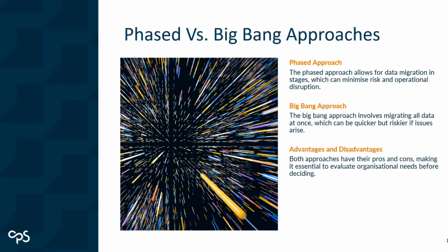One of the biggest cons with the phased approach is the longer duration it takes. It really depends on the amount of projects you're looking to use. We've worked with clients that have exported along the lines of 2,000 or 3,000 projects, to some that have only done 20. Depending upon that approach, the duration can be massively extended if you're utilizing a larger number of project subsets, and you're pushing out that timeline on the dual running operational costs of the two platforms.